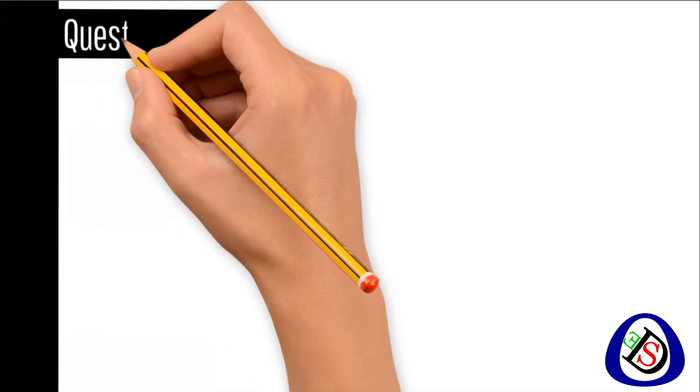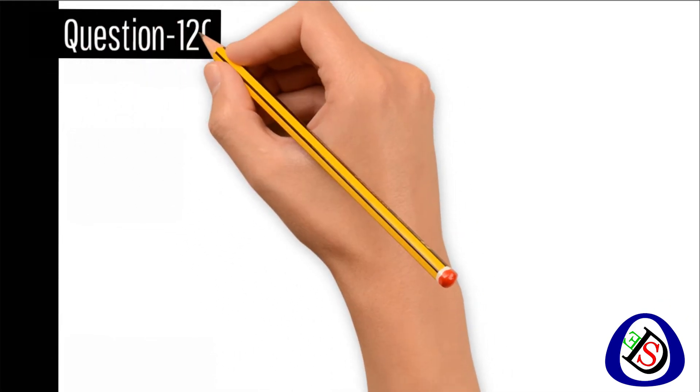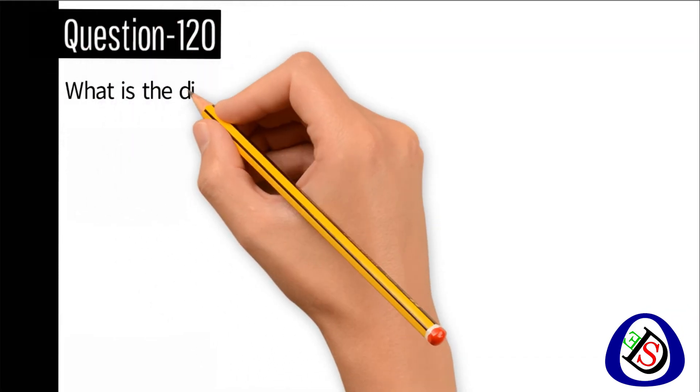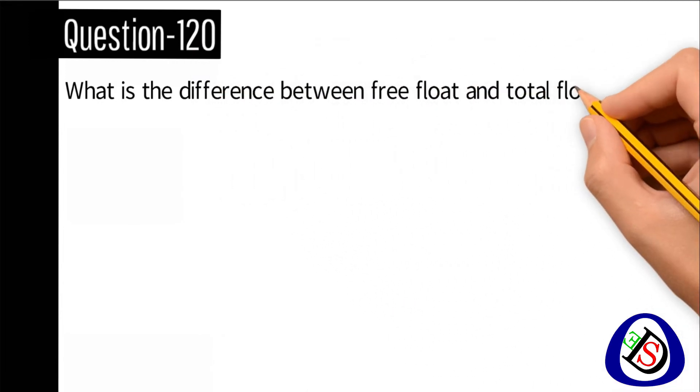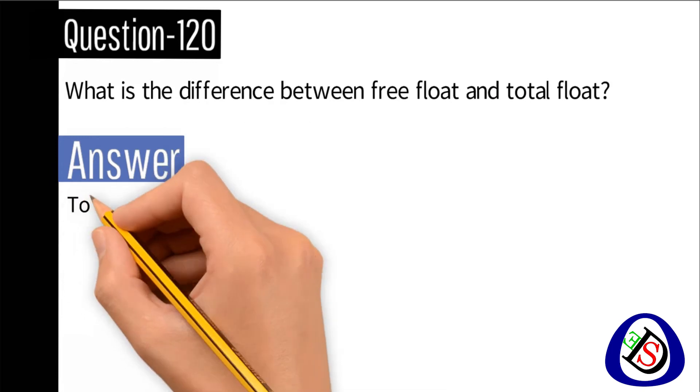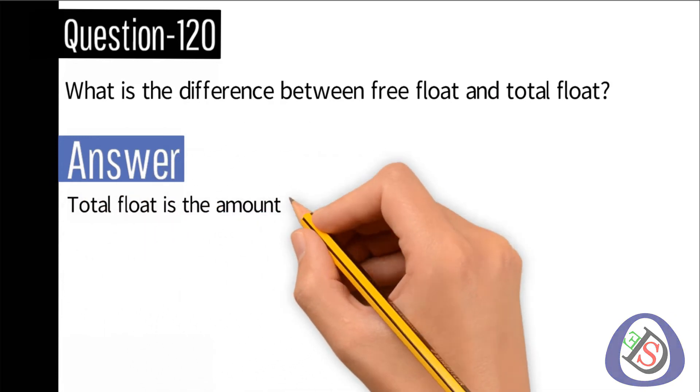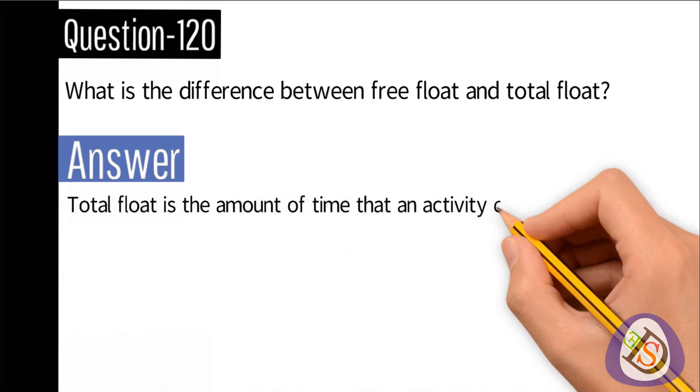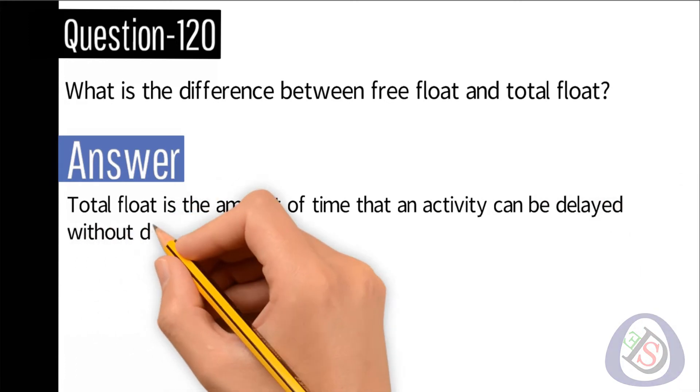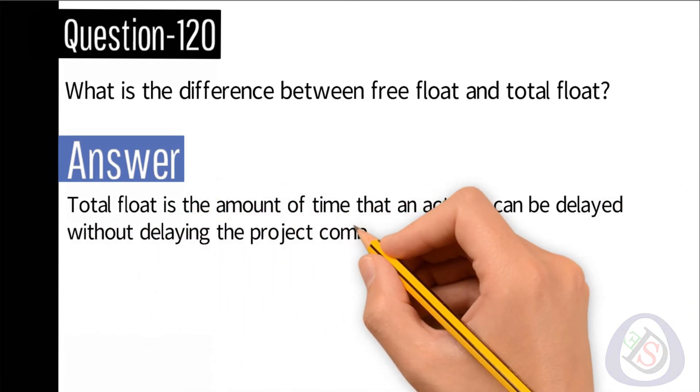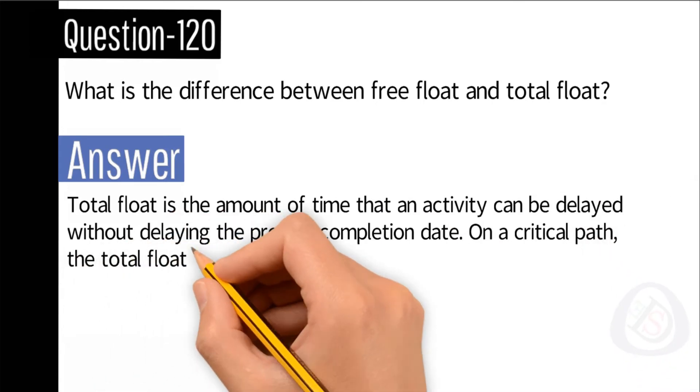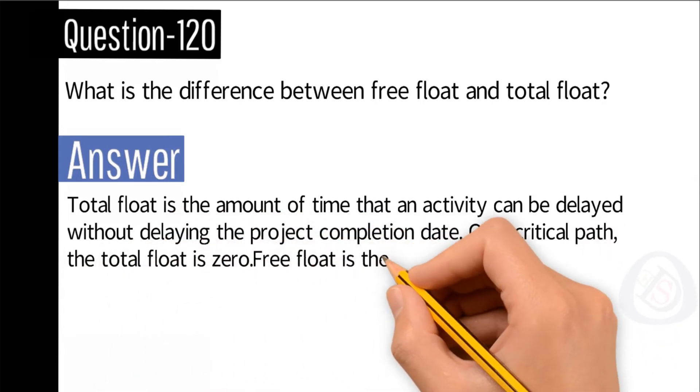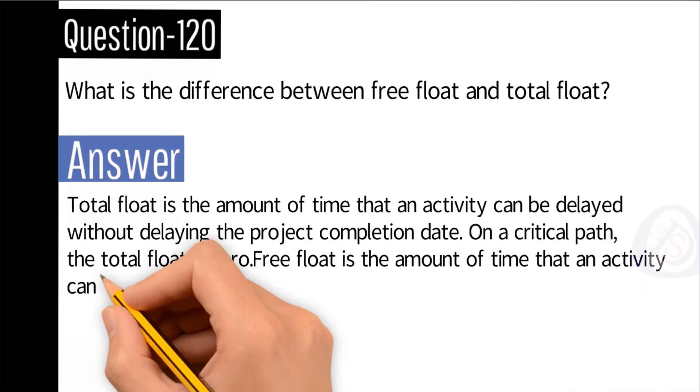Question number 120: What is the difference between free float and total float? Answer: Total float is the amount of time that an activity can be delayed without delaying the project completion date. On a critical path, the total float is zero. Free float is the amount of time that an activity can be delayed without delaying the early start of its successor activity.